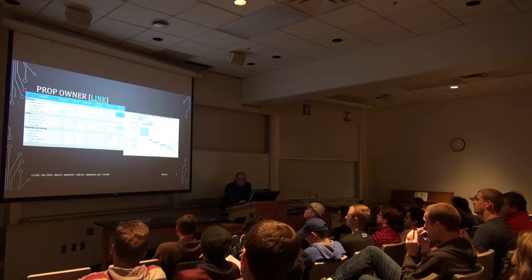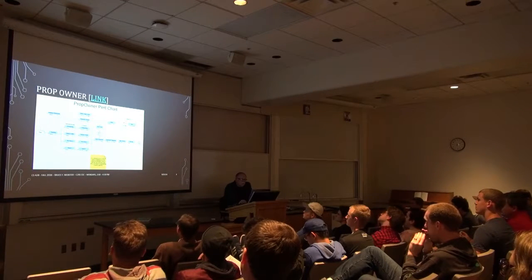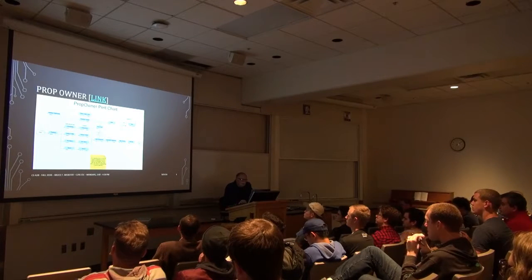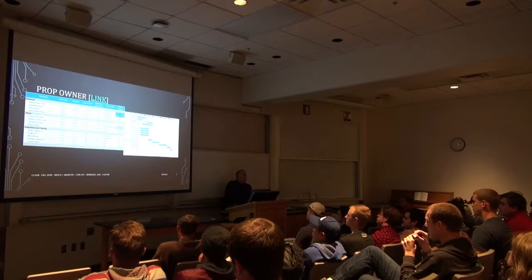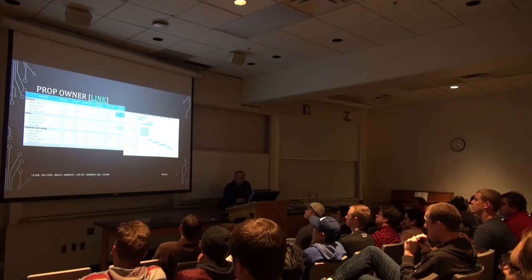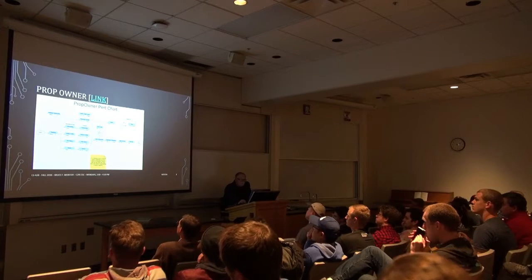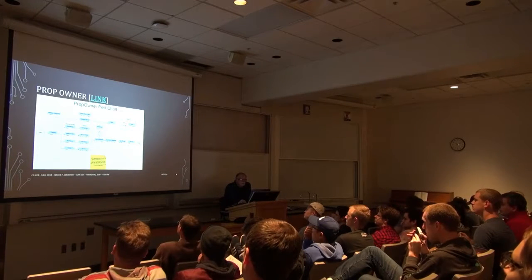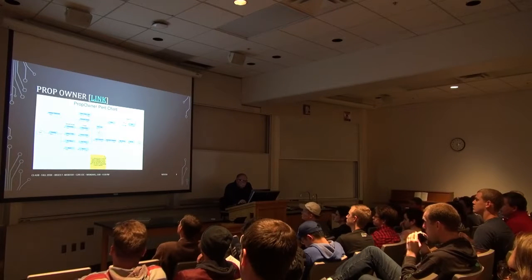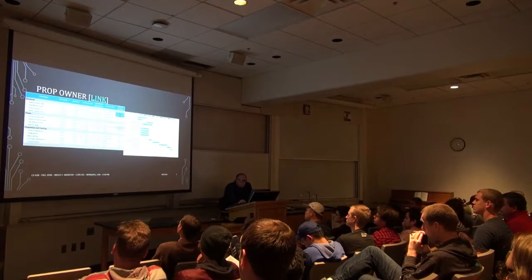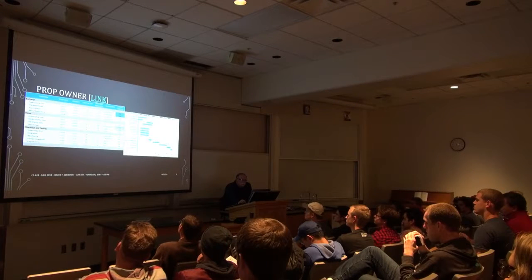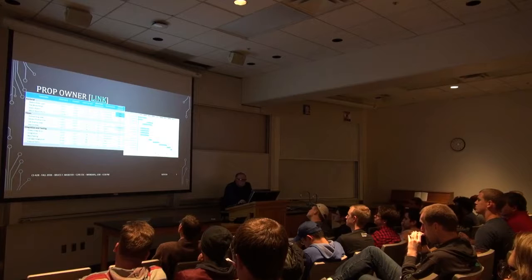Again, here's the Gantt I did first. Here's the PERT. Got them out of order there. Again, probably about the level of detail I was looking at. Let's talk about this briefly. Sorry, if you can go to the PERT chart first. Sure. We did this one first just to see what our critical path was. We basically have the front end side, which is the application side, and the database side, which is on the top. And then after we made the PERT, we went to the Gantt chart, and that was a good indication of how the parallelism of the project was going to be at the beginning, and how everything will merge towards the end.